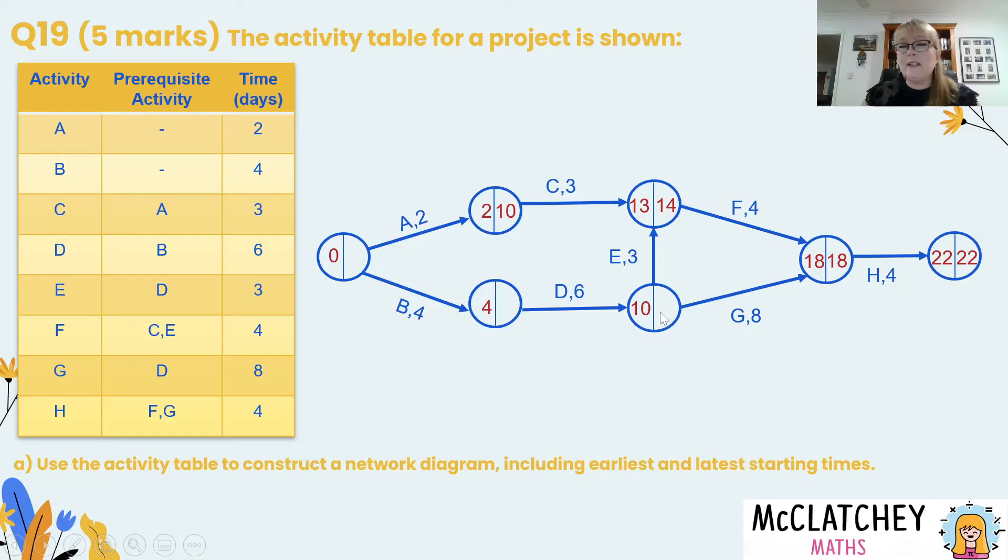Now when we're going backwards through the network we actually choose the lowest option. So forward highest backwards lowest so that would give us 10. Then we've got only one choice going backwards that gives us a 4 and then of course at our starting point we have our second zero there. So now we have forward and backward scanned through the network and evidence of that was our third mark.